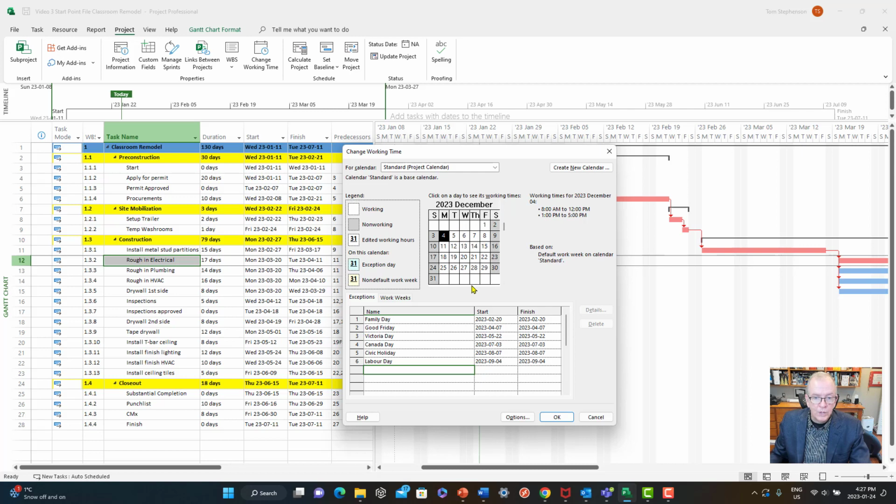You got to look at, well, what does your company do? And you got to make sure that you block it off. Because if you only block off the 25th and the 26th, and then you end up taking the whole week off, well, you'll come back 3 days behind schedule because it would have assumed you worked these days. If you want to block off a whole long time period, the easiest is, again, pick the day, the start date, and I'll put Christmas holidays.